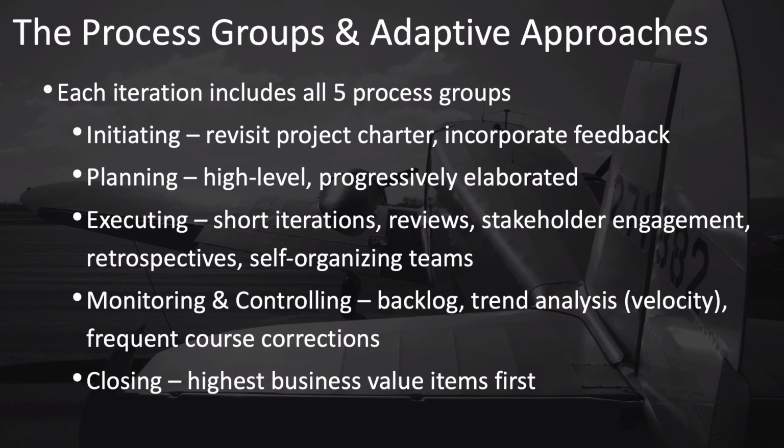The closing processes, by focusing on your highest business value items first, if you need to end a project early, you still have some value that has been delivered.